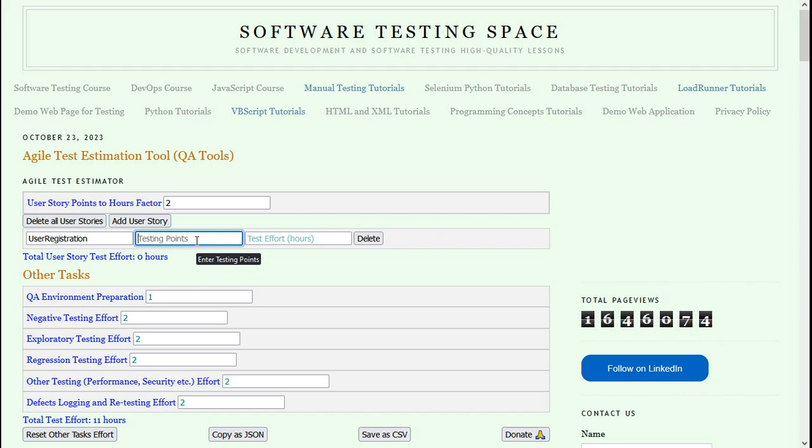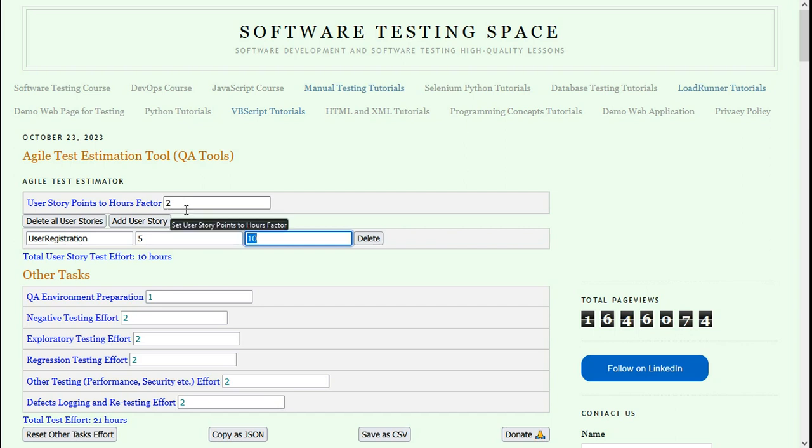Let's say this user registration user story has a total of 12 story points. I am going to include just 5 for testing. Here it multiplies this number by this factor and automatically gives it.